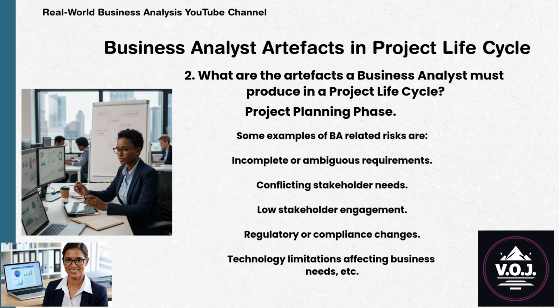Some examples of business analyst-related risks are: incomplete or ambiguous requirements, conflicting stakeholder needs, low stakeholder engagement, regulatory or compliance changes, technology limitations affecting business needs, etc.